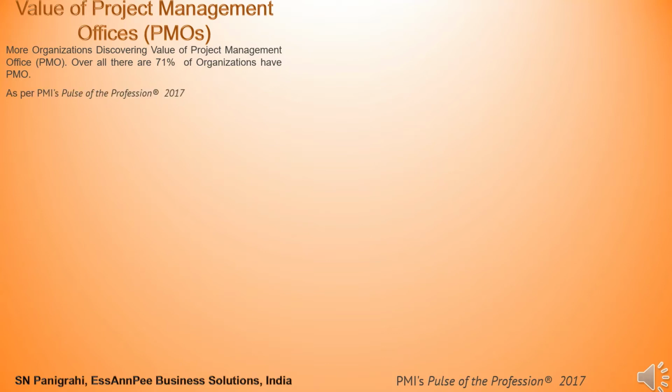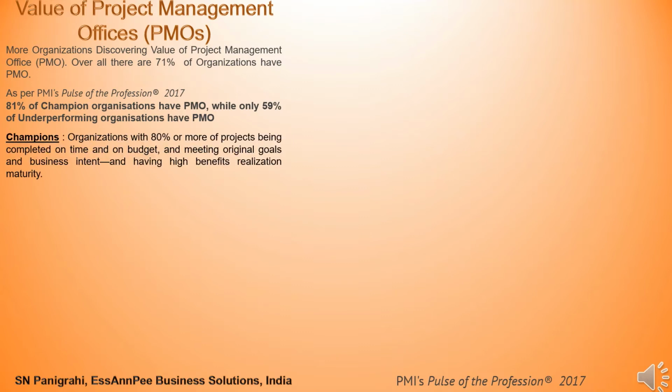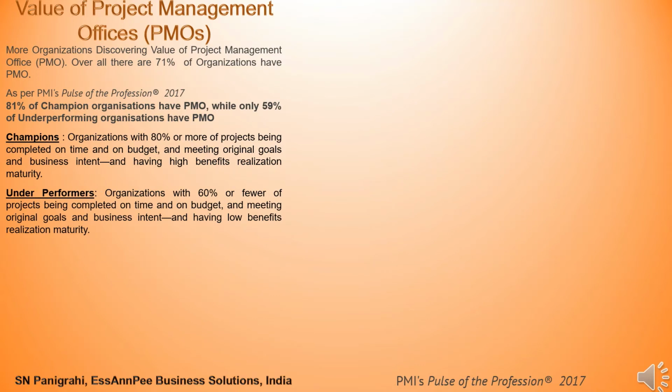As per PMI's Pulse of the Profession 2017, 81% of champion organizations have a PMO, while only 59% of underperforming organizations have a PMO. Champion organizations are those with 80% or more of projects being completed on time and on budget, and meeting original goals and business intent, and having high benefits realization maturity. Underperformer organizations are those with 60% or fewer of projects being completed on time and on budget, and meeting original goals and business intent, and having low benefits realization maturity.